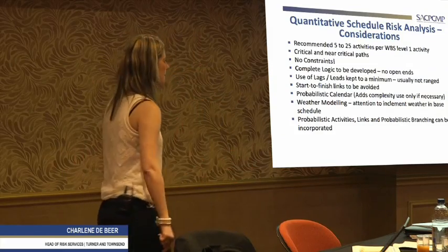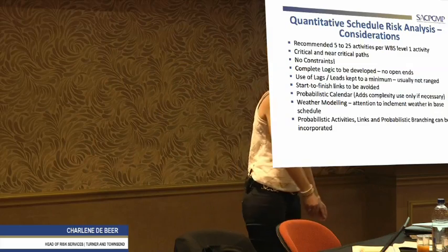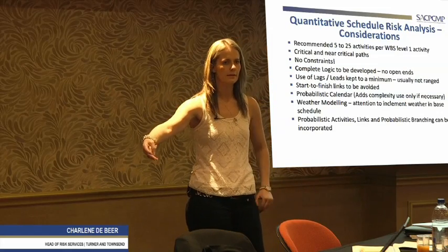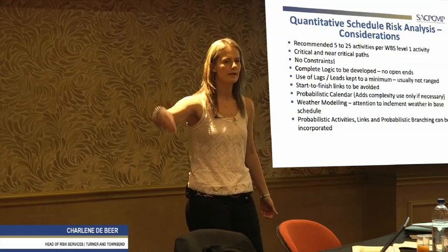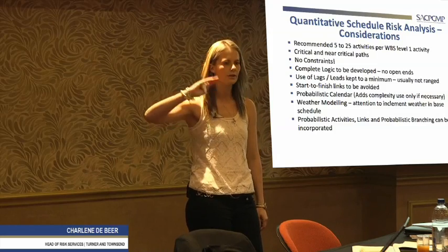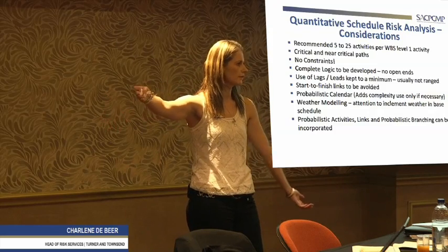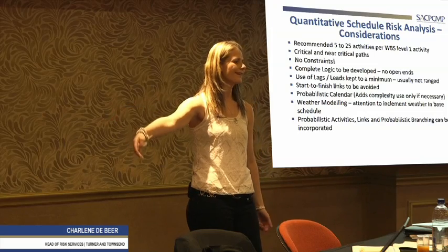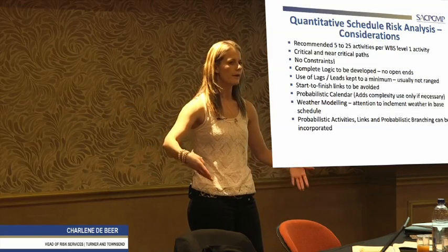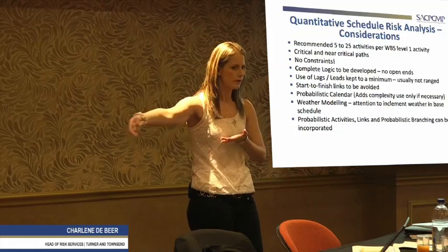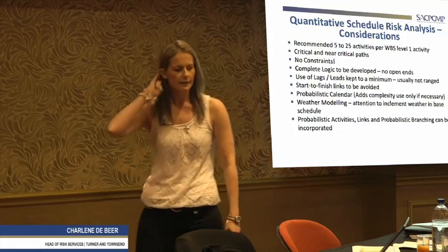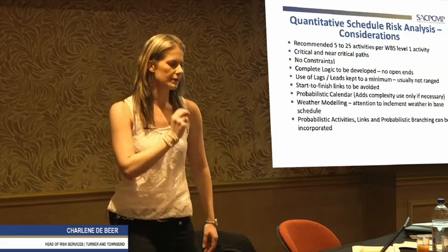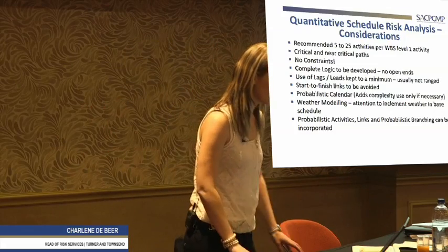So we never say the risk is going to happen on the start date or the risk is going to happen on the end date. Because if I attach anything to the end date, whatever I link to at 6 weeks, it's literally going to run out with 6 weeks. So if you attach it to the last activity, it's not going to be very accurate, unless it's literally in the final week and now it's going to knock on the commissioning. So link it to the specific activities in the schedule which are going to be impacted.